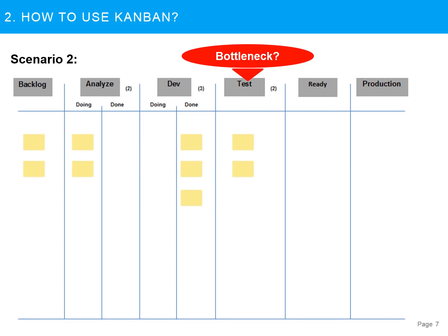Maybe we can increase the WIP limit for the testers to 3 and bring in another tester. But isn't it an easy and quick resolution to our issue? With this spirit, if we keep on increasing our WIP limits every time we hit a bottleneck, we would soon require an army of resources to keep the work items flowing on our Kanban board. While there's nothing wrong in increasing WIP limits, this usually is not our go-to preferred option.